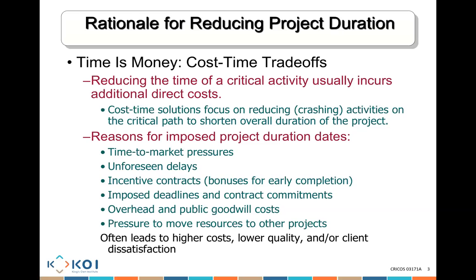Pressure to move resources to other projects, and this is especially the case in multi-project environments where you are working on more than one project at any point in time. And when you try to finish the project much quicker, a lot of times it means I'm adding more people, and because I'm adding more people, it's going to cost me more. And because I'm rushing things to happen within a certain period of time, the quality a lot of the time might be lower, and you might reach customers who are not very happy with the work that you managed to produce for them.